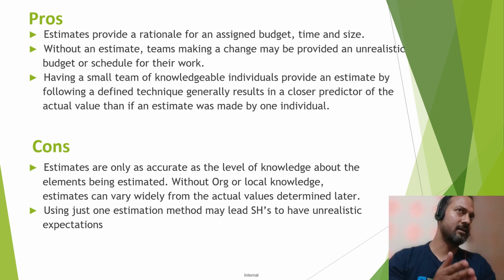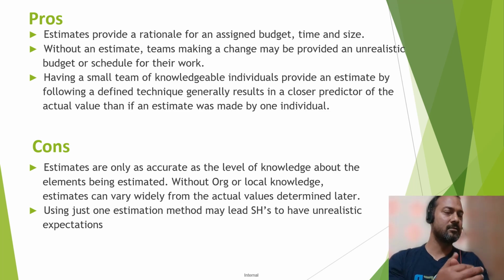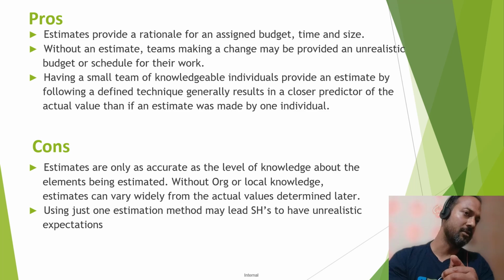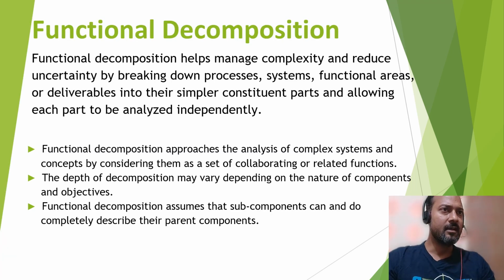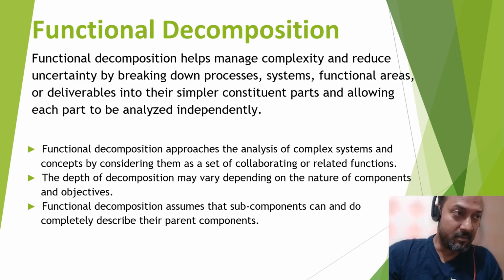And as I said, in a PERT, when we calculate the estimated time, the optimistic time, most likely and the pessimistic time are used to calculate the expected time, then it becomes more realistic. So the sample size is big, more data is available, you can implement the methods or the techniques easily on the sort of data, and then you can arrive at a more realistic picture. Then the final one, functional decomposition.